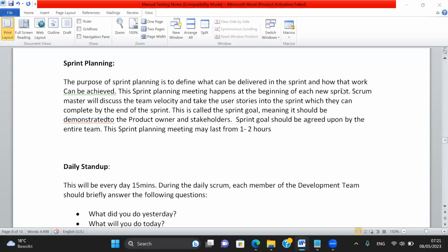Okay, planning. Clear? So what happens in the sprint planning? They will decide how many stories, how much work they can deliver at the end of the sprint. Is that clear? Yes, sir. So Monday sprint planning is over. Monday morning, we all go back and we start working because we know what to work on. Yes or no? Because we have taken those 8 stories or 5 stories. Assume from a backlog of 8 refined stories, we have taken 5 stories to deliver. So we promised now that we will deliver these 5 stories at the end of the sprint. How many stories did we promise?